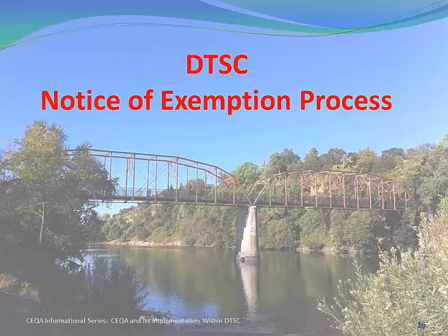It's on a case-by-case basis, and so it just depends on the site conditions. For example, if you have a project that is within a habitat area for kit fox, let's say, and the project would have the effect of reducing the habitat area for the kit fox, that could be considered an unusual circumstance, for example, or it could be other things.